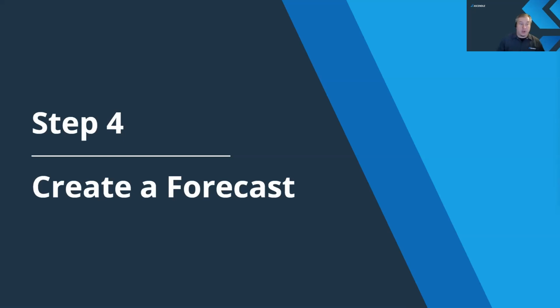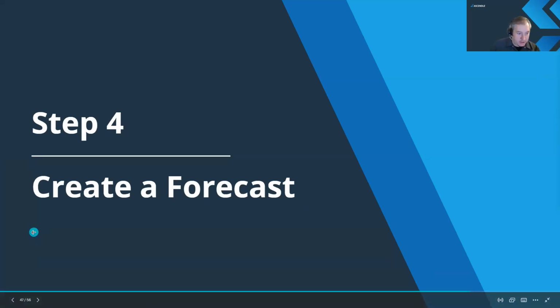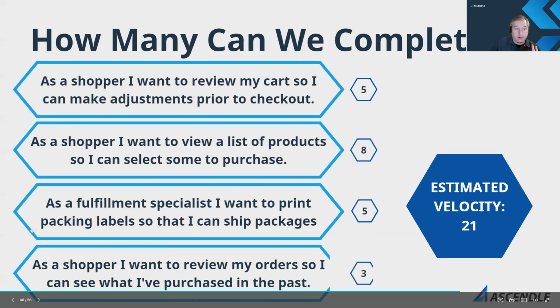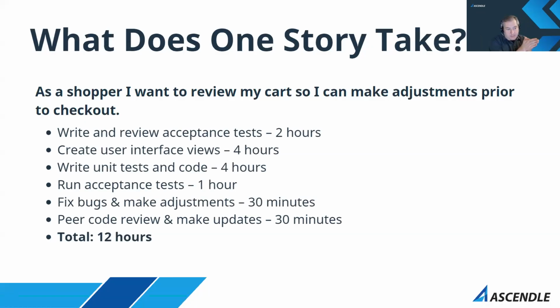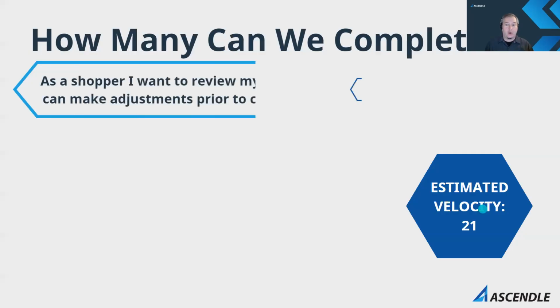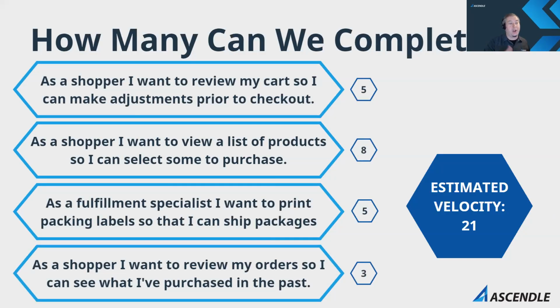So Michael had a question, and I do want to cover that. What we were doing, Michael, is micro-estimating a handful of stories, by the hour, in order to understand roughly how many of those stories will meet our net capacity. Then once we take that number of stories that meet our net capacity, we review those story points and add them up. And that is our rough estimated velocity.